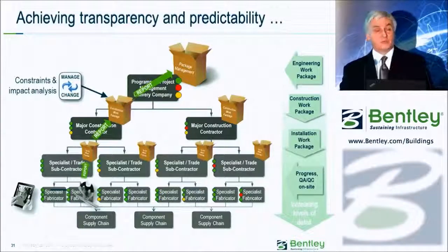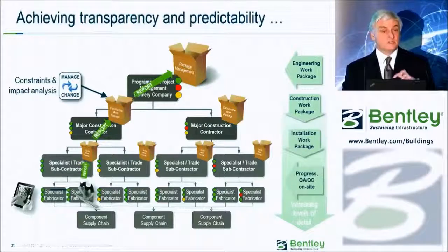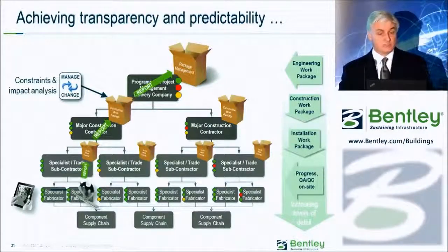And it's at this point we want to manage change. We needed some mechanism to hang change off, and it was this work packaging process that we decided to hang change from.